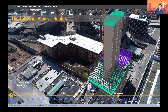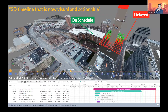We don't need to automate everything. We can rely on civil engineering knowledge and use a few control points to guide how the design sits in the actual scene. If you can achieve that, your plan has mapped against the reality on site. That means every day on the calendar, a superintendent on the job site can log into a system and see who does what work in which location, communicate that to folks on site, extract quantities from the model and from reality in contrast, and automatically find these changes through color coding.